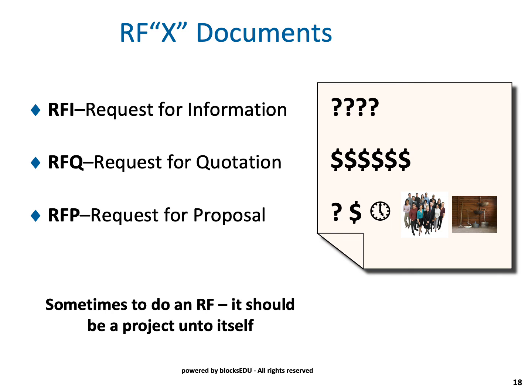And again, as an organization, you are compelled to actually evaluate each one of those in order to make an assessment, and you must let people know what they scored, and anyone has the right to have a review with you. So it can be quite time consuming. Now my advice to these RFIs, RFQs, or RFPs is treat that as if it was a project unto itself.